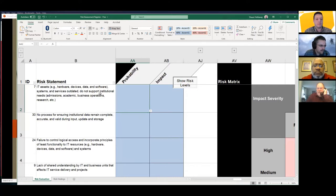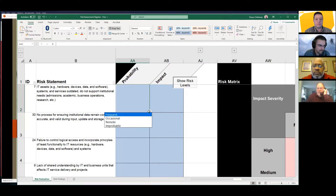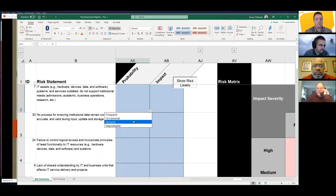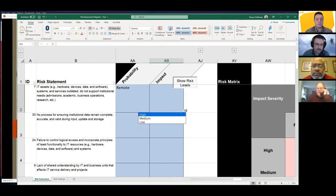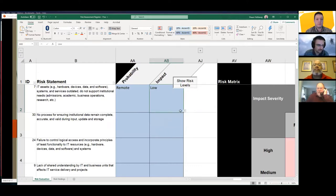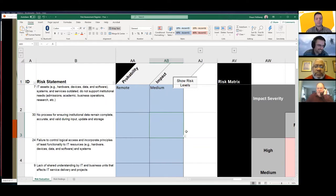Our first risk statement is: IT assets, systems, and services are outdated and do not support institutional needs. There are two columns: probability — with options of frequent, occasional, remote, and improbable — and impact, rated high, medium, or low. What is the probability that IT assets and systems do not support institutional needs? Remote. And if that remote chance were to happen, what would the impact be? Medium.